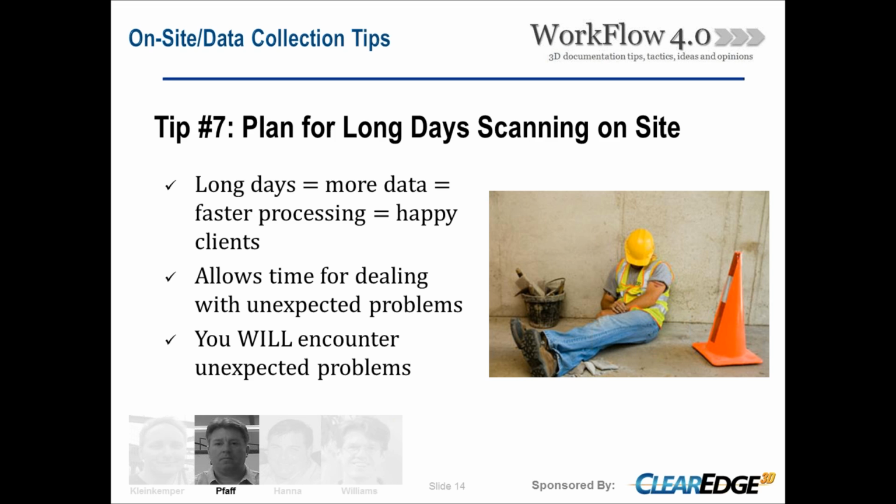As far as our experience, typically, if you are on site longer, it reduces a lot of moving equipment around, setup time, access time, especially in the evenings. A lot of these projects we end up doing at evening sites, and the longer you can be on site, the more profitable you'll end up being, especially with travel time.